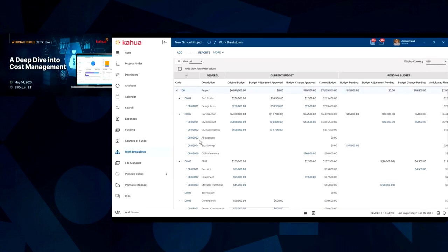These cost codes here are just some sample cost codes. These will be adjusted per your requirements. We've got some customers that have very simple flat structures. They may just have one level of cost codes and they just need to track 8 or 10 critical items, and it's simple and easy. They get a lot of value from having it consistent across projects. We have customers that have many levels of depth of this cost coding structure with 7 or 8 levels of codes. We can handle more than that, but that's usually about the max of what we see out of customers.